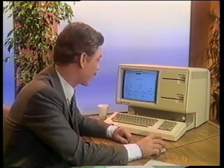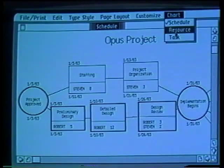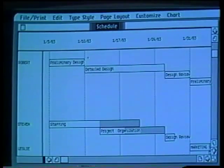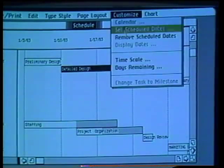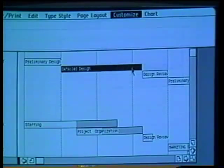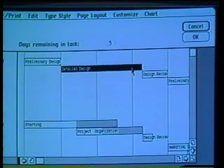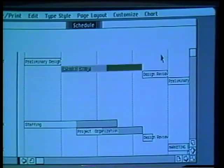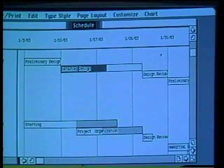Let's see how this new job will affect his workload. I'll ask LISA for a resource chart. I can see that with this new project, Robert will probably be overbooked, but Stephen has some slack time. Once the project begins, I can monitor work progress by entering the days remaining on each task, which automatically updates the resource chart. LISA project simplifies scheduling, so I can manage my resources better.